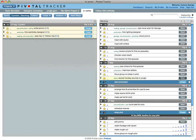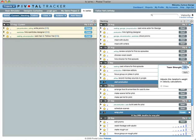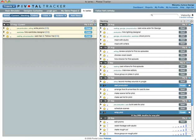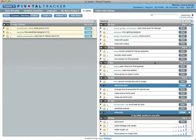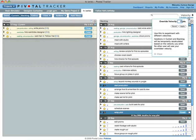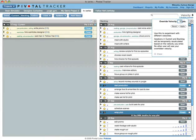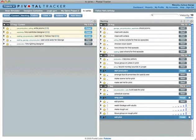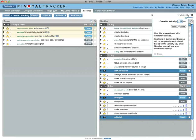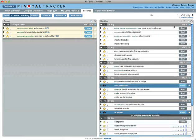When team members go on vacation, you can adjust an iteration's team strength to keep velocity calculations accurate. View a hypothetical timeline by overriding your velocity. Keep in mind that this is a private, temporary change. Your velocity will continue to be based upon your team's performance in recent iterations.